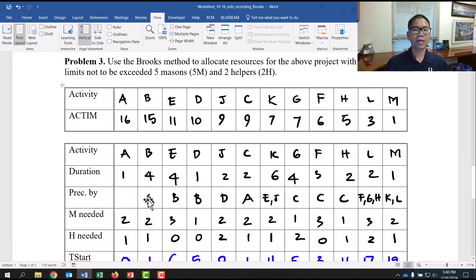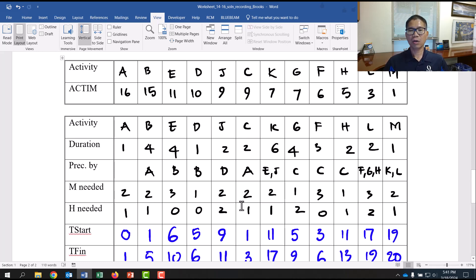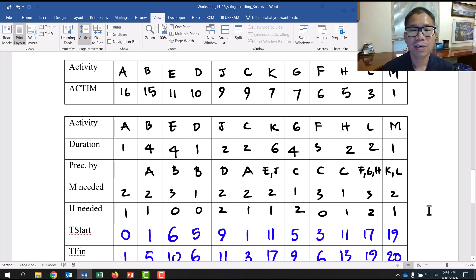For example, B has A as predecessor, E has B, D has B, etc. Then list the resource needs — in this case, M (masons) and H (helpers). Activity A needs 2M and 1H, B the same, C needs 3M and 0H, and so on. This is easy to list out from the given schedule information.